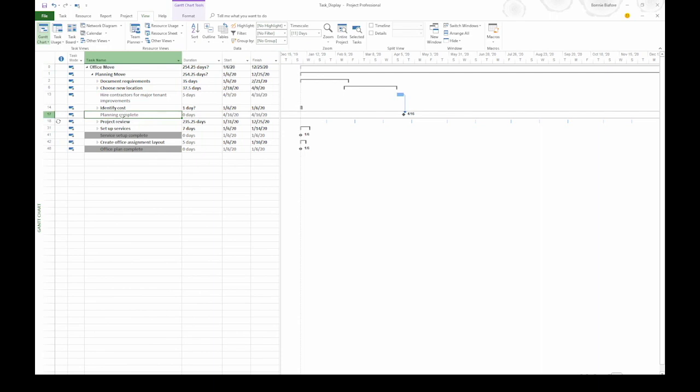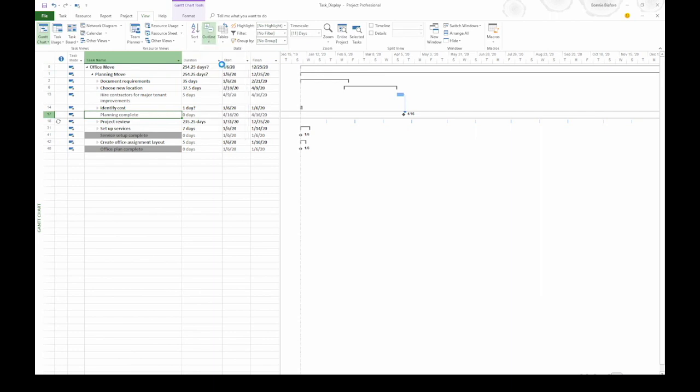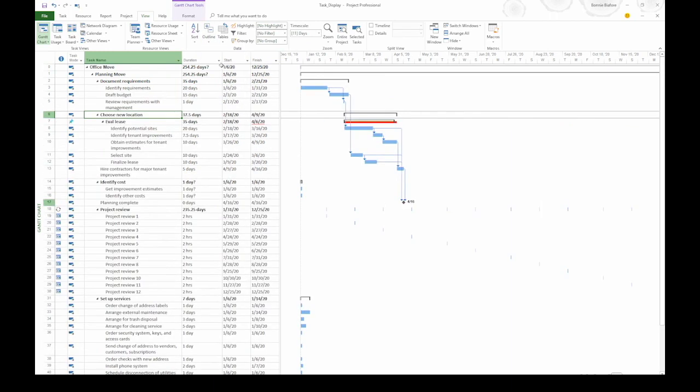When you're ready to see all of the subtasks again, go back up to the ribbon, click Outline, and then choose All Subtasks.